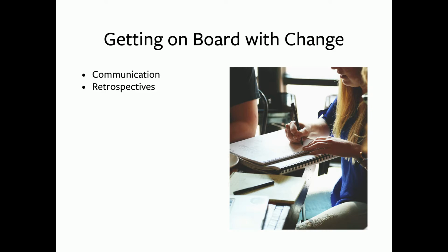And then the other thing that I'm bringing up again here is the retrospectives. When you're first starting a project, I highly suggest doing retrospectives at the end of each sprint because you've just started that process. You don't really know if it is going to work. You're hoping it is, you think it will, but the retrospectives at the beginning are just crucial to knowing if it is working for your stakeholder, if it's working for your team, or even yourself. So just having those at least every sprint at the beginning of the project, and then as you're settling into your process, you can wait and maybe do one at the end of the project.